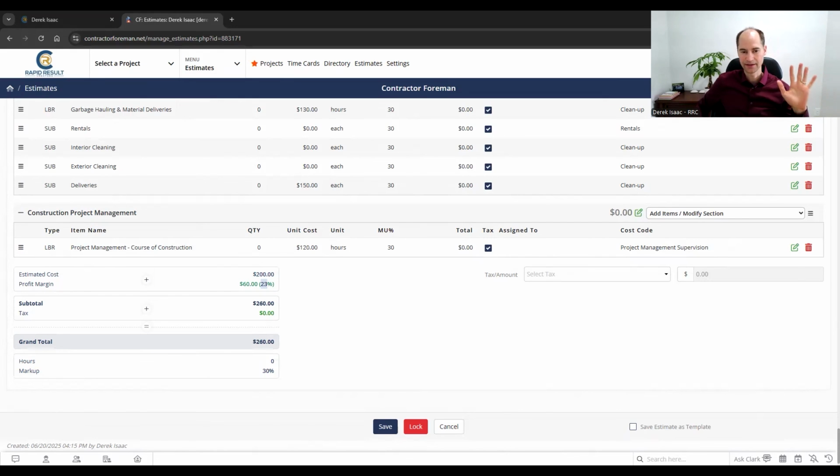Now, 15% overhead, and then let's say you've got a 5% contingency that we haven't accounted for yet. We've got some miscellaneous in there, but we don't have any contingency in this template. And I would suggest you probably want to put some in. I don't have it in my template, but it's a good idea. But let's say you're considering 5% contingency, you could have an overage on this project by 5% of your costs. That puts you at 20% overhead plus contingency. That leaves 3% margin for profit. Now, it's pretty hard to work off 3% profit, and that's still very little margin if anything goes wrong or things take longer, what have you.